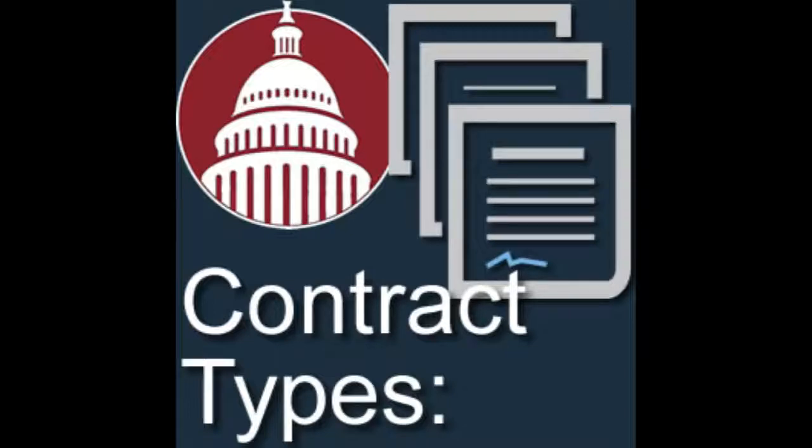In order to do this, you have to be able to properly track your costs and be able to bill your actual costs. So it's a more sophisticated contract type, and it's much more difficult for a small company to run a cost reimbursable type effort just because of the extra back office it takes to be able to track the cost to the government's satisfaction. And this is where the government audit agencies get involved. We're used to DoD, right, where you have the DCAA and DCMA, Defense Contract Audit Agency. Yeah. Defense Contract Management Agency.